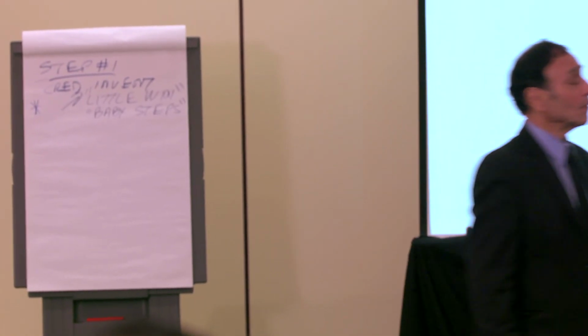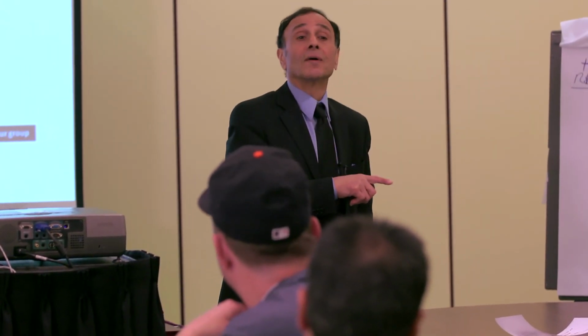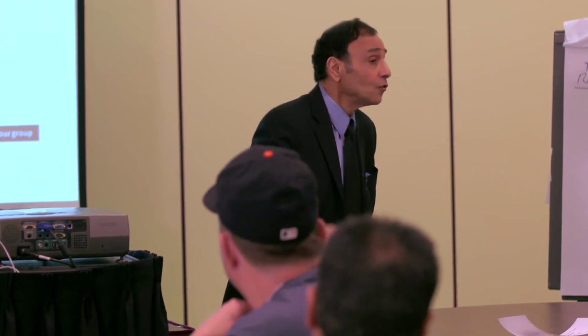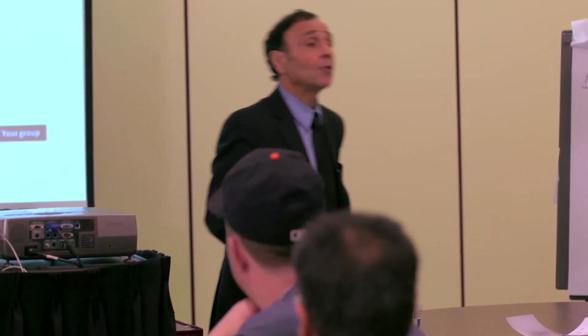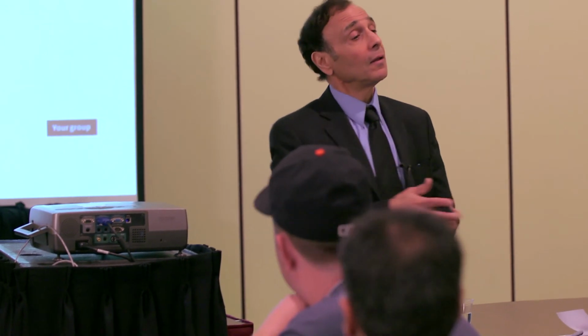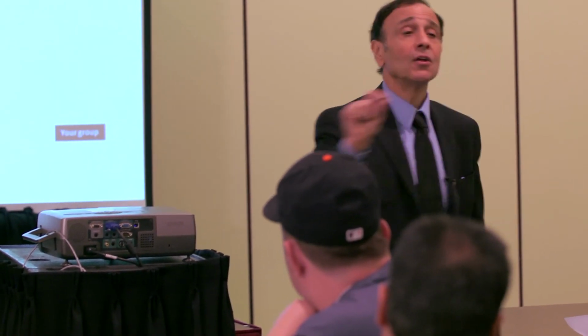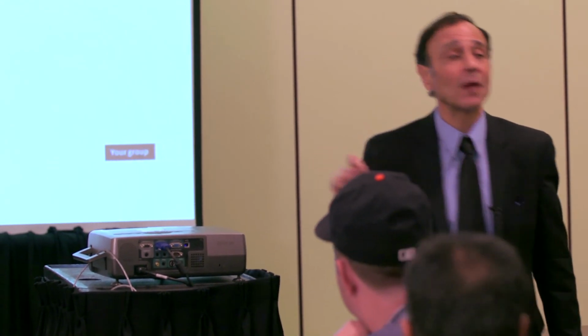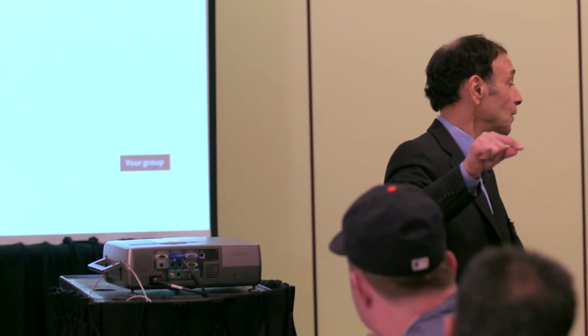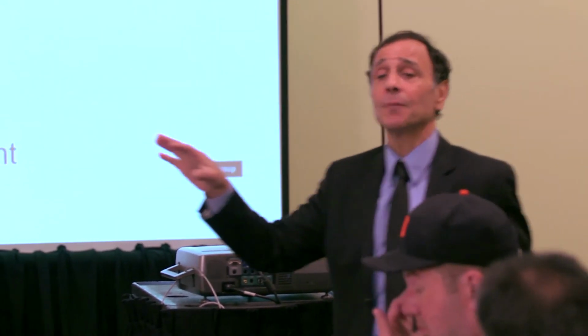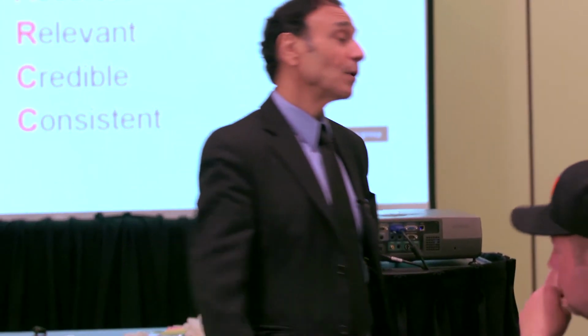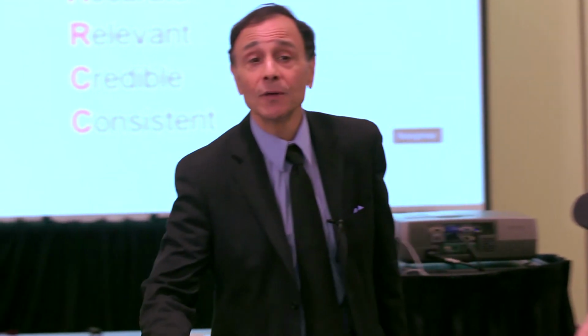Have a good plan of what you're going to do to bring it back to where it should be. So a realistic plan that they understand and that they can buy into. And then within that plan, the first thing that's on the plan, you better stress and strain and make sure that's accomplished. So you got a plan, and the first item on the plan fails, well, that doesn't really do much for your credibility. But if you can get something on your plan that you can achieve, even if it's a tiny thing, then you establish that credibility.